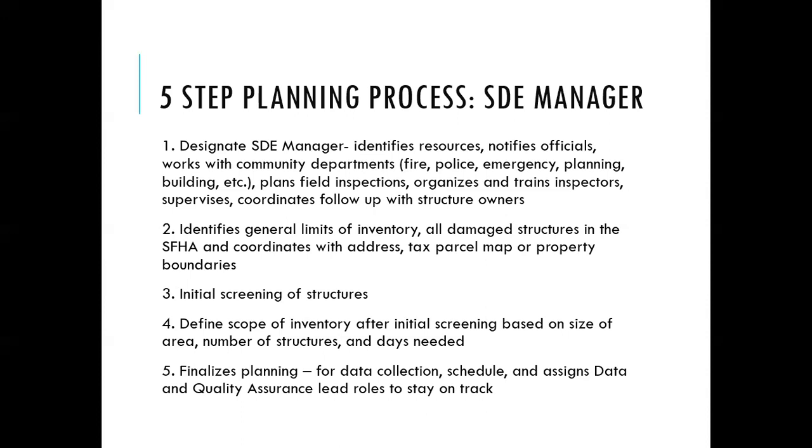So, again, defining the inventory, where all assessments need to take place, do an initial screening based on the size of the area, the number of structures, and then trying to determine how many days you're going to need to complete those assessments, because, again, time is of the essence. During the recovery phase, people are going to want to start rebuilding and getting back to normal, but we need to make sure that they're properly permitted and coming into compliance if that's what they need to do.